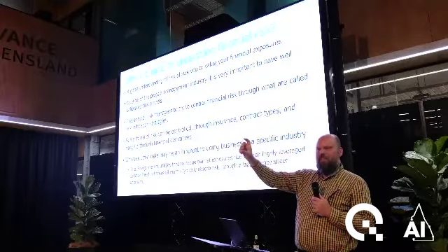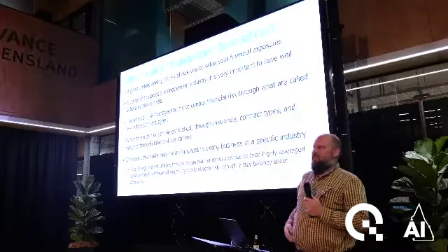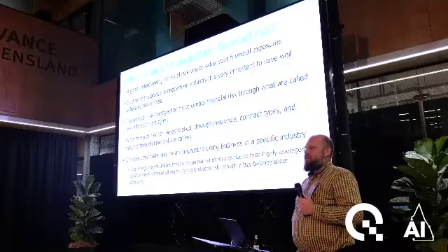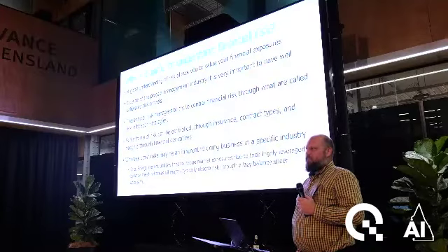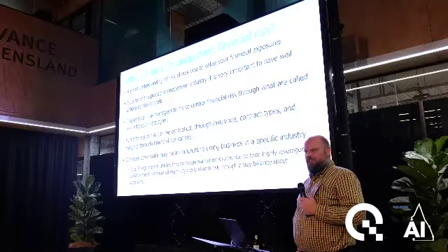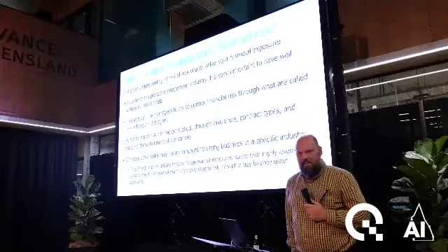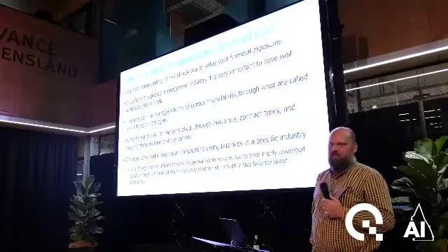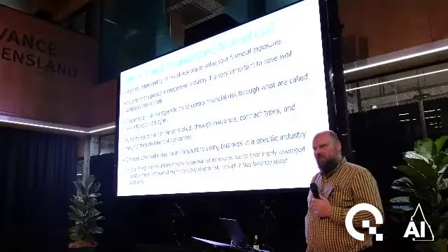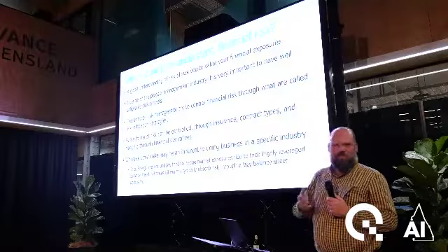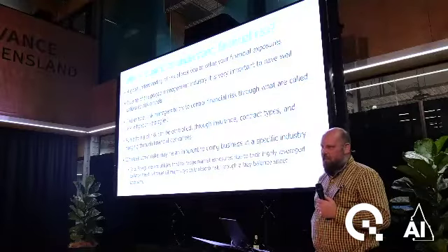So the drop from the P50, where I'm expected, down to the P5, that's my profit at risk. In a lot of those companies you have different layers of risk management committees, and if you breach certain tests, they'll have to go back and mitigate those risks. If you're in the financial industry, you might do hedging. If you're in some other industry, you might have to change some management procedure or process that you're operating there.